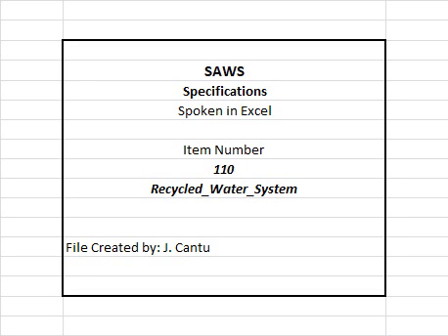D. Submit written verification from the pipe manufacturer demonstrating compliance with the production and delivery schedule of the pipe as indicated in the contractor's preliminary critical path method schedule. E. Submit written verification from the mechanical fitting manufacturer that fittings are compatible with proposed pipe and meet the requirements of this section. 2. Contractor shall submit manufacturer's product data, installation recommendations, shop drawings, and certifications.